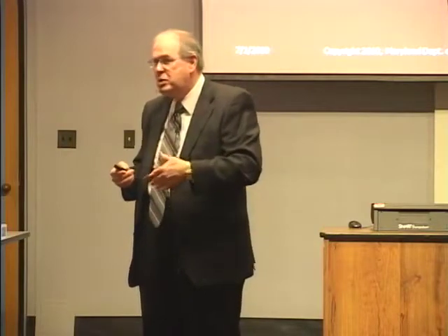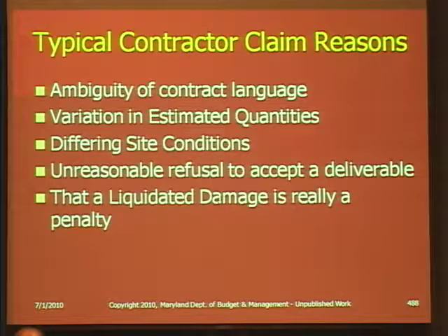So the reason we have these things is this concept of risk. If vendors don't know what they're getting into, and they're the ones on the hook for whatever expense, a vendor that wants to stay in business, which most of them typically do, is going to build in a hedge for a risk factor. And that's why the concept is, if it's something where you have reason to believe there might be risk, oftentimes the best thing to do is to take the risk on the state so that we're only paying for the risk if it actually materializes, versus a vendor charging for it if they have the risk and they get the same amount of money whether it happens or doesn't happen. That's what these two clauses are designed to do. Transfer risk from the vendor to the state so the state only pays for it if it happens. And if it happens, then what's it worth? And you can get into a claim situation because of that.